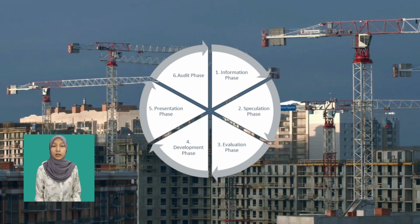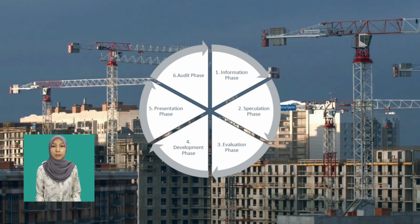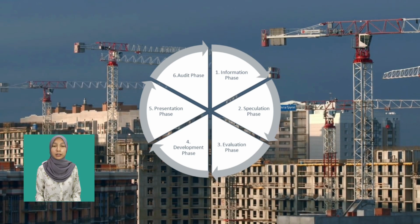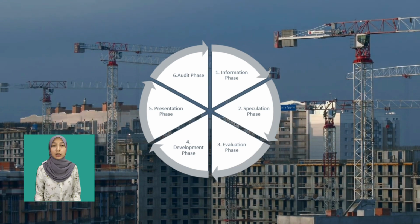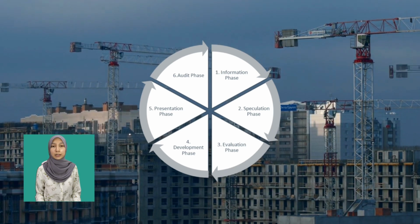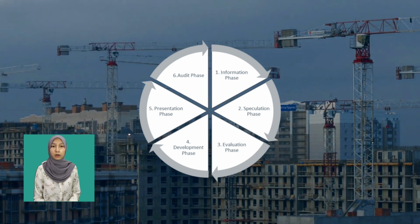Thirdly, the evaluation phase, where each potential design idea is thoroughly evaluated by the value engineering team to ensure there will be no significant deviation from the intended functionality. Fourthly, the development phase, where the value engineering team develops the chosen alternative to accomplish the anticipated purposes and value of the element. Minor changes will be added to guarantee the alternative designs are completely capable of performing their functions identical to their original design, but at a lower maintenance cost and initial cost.